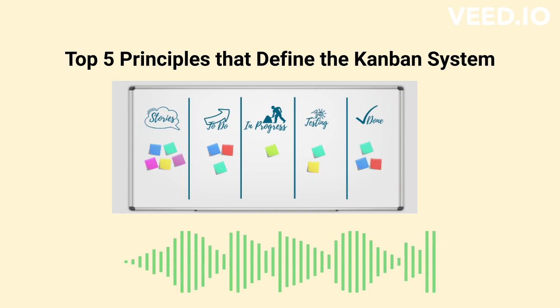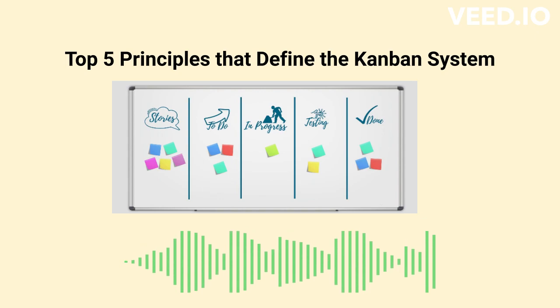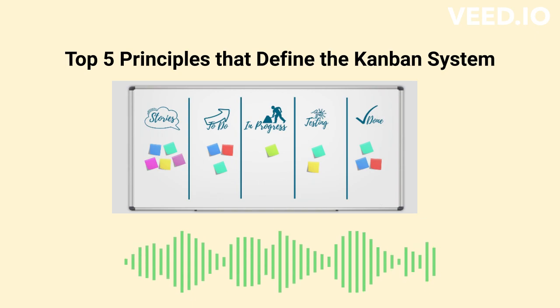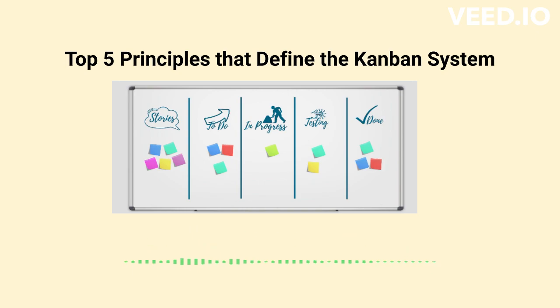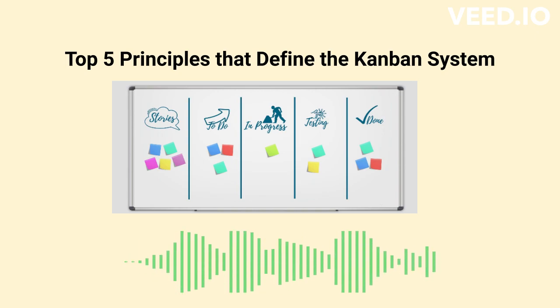We have classified our writing tasks into 3 major classes: to do, WIP, and done. WIP is again divided into writing, editing, and reviewing. These boards may be virtual or physical boards with sticky notes. Just prepare a process flow according to the requirement and classify your work. Kanban boards can be implemented within a team, individually, or within a company. These boards offer the following benefits: analysis of cycle times to improve average cycle duration, limiting the amount of work in progress to eliminate waste, utilization of resources.